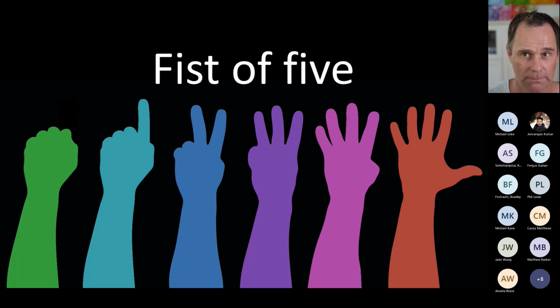If you've got 4 or 5 fingers showing, that's great. So your team, everybody's confident that you can get 10 stories done. Add another small story on, make it 11. Play Fist of Five again. Do we think we can get 11 done? Yeah, we do. Okay, great. Everybody's still showing 4 or 5 fingers. Add another card on. Got 12 now.